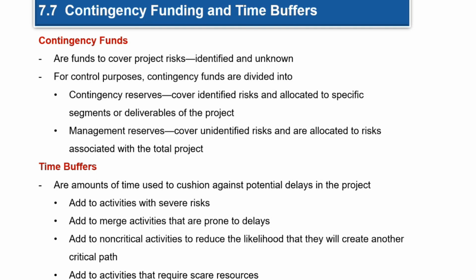And there is also a possibility to use time buffers. Not only funding can impose risks; limited time can also impose negative impacts in the project and cause issues. So give the project scheduling some time buffers. Add a longer time buffer to activities with severe risks, to activities that are prone to delays, and to activities that require scarce resources. Give the time buffer, basically using time to exchange for cost, to exchange for financial resources.